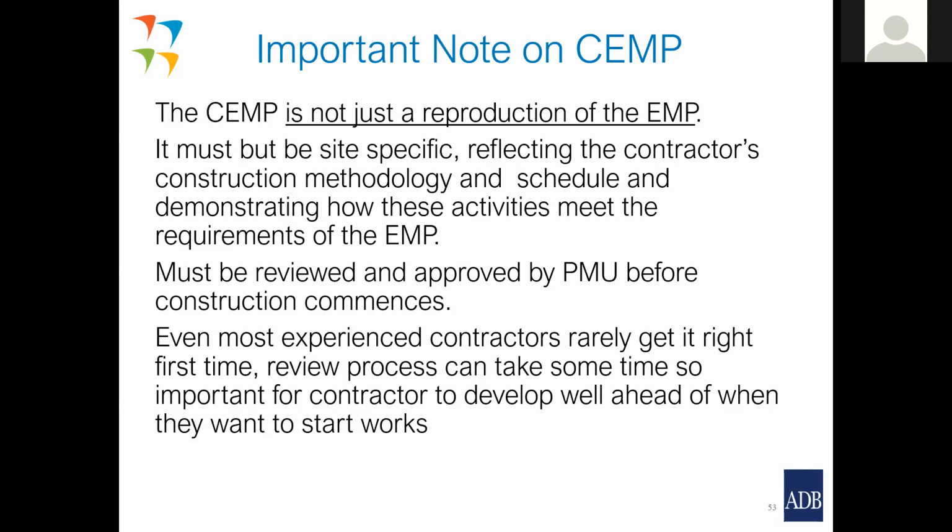It must be site-specific, reflecting the contractor's construction methodology and schedule, and demonstrating how these activities meet the requirements of the EMP. It must be reviewed and approved by the PMU, the project management unit, before construction commences. And just a note here, even the most experienced contractors rarely get it right first time.